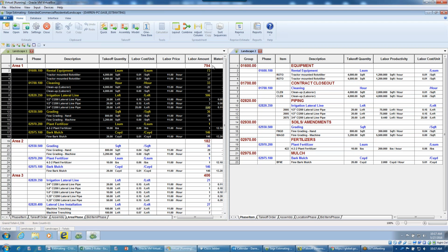And looking at that, I always like to talk about where are we going to go if, let's say that this project, for whatever reason, was put on hold, financing, whatever it may be. Let's say that this is an older estimate. Our database has fluctuated. It changes. We've updated pricing, labor, materials, so on and so forth. Well, I want to reprice this old estimate with the new database prices, reprice from database. Boom, done. You're good to move forward. We've got the new pricing.